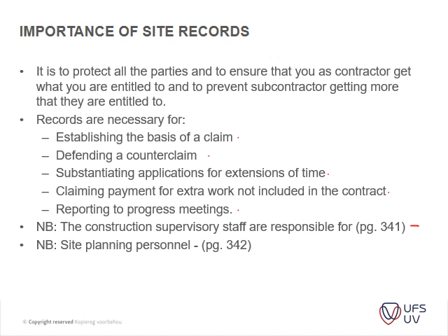Whereas on page 342, the site planning personnel should be responsible for updating the short-term program each week or fortnight, recording progress each week on all the relevant construction programs, e.g. weekly, monthly or so, preparing records for contract as-built programs as work on site progresses, then recording the effect of program delays on the final account completion date.